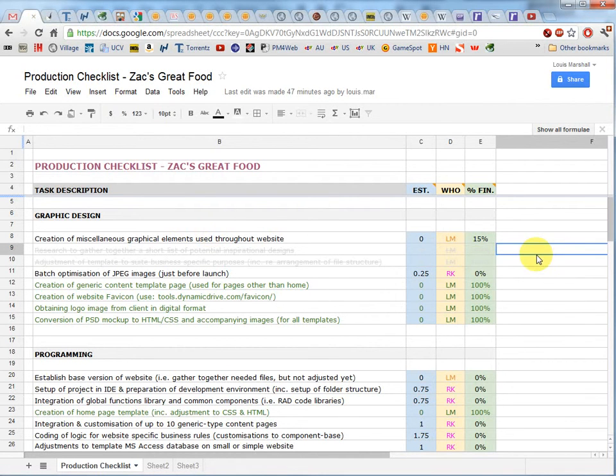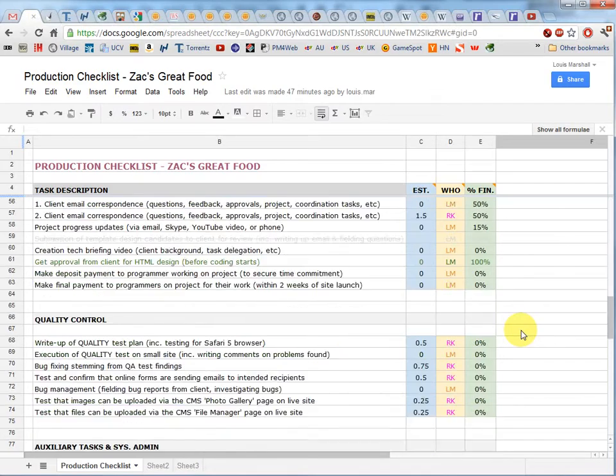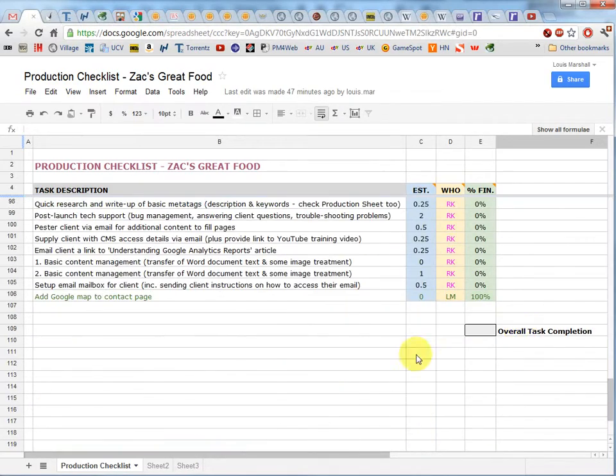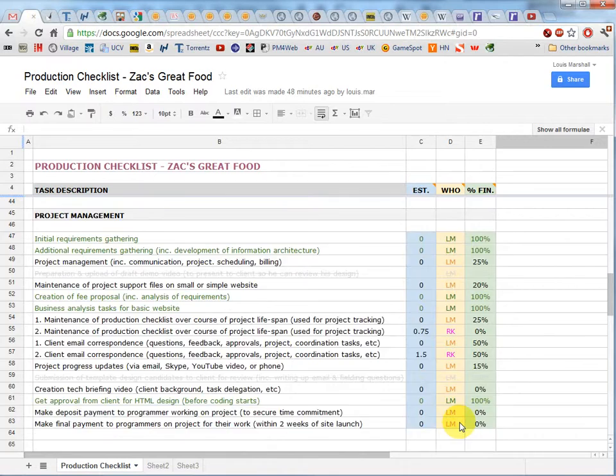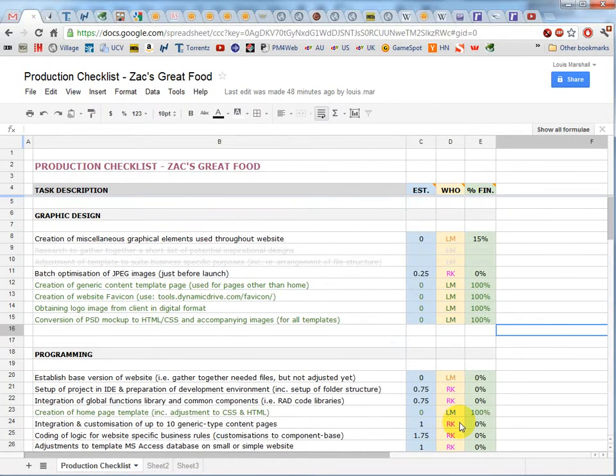Now one of the things I've done with the production checklist is I've pre-filled your hours. This is based on information from 2 previous projects, stuff we did on corporate graphics and some of the stuff on the Dad and Me website, but this is all open to you to revise. You do need to look through this because you have to be sure that I've given you enough time. Some things I've estimated and then added additional.